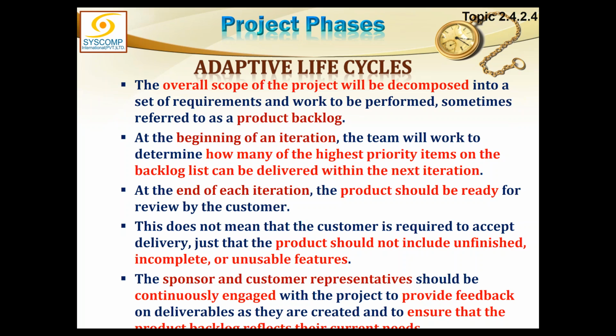So the team mutually decides, looking at the work on top, they can do top job number 1, job number 2, job number 3. So they declare we will be able to accomplish the top 3 jobs. Top 3 requirements will be fulfilled. So this is not somebody assigning jobs to these people.